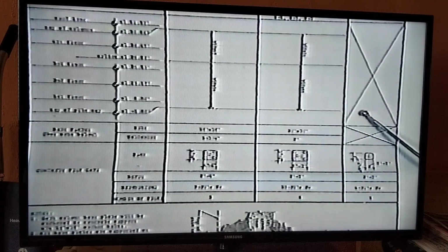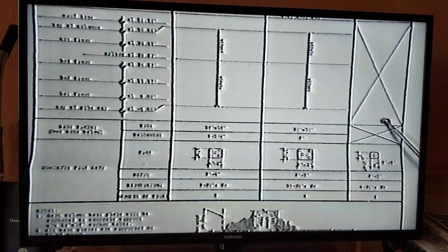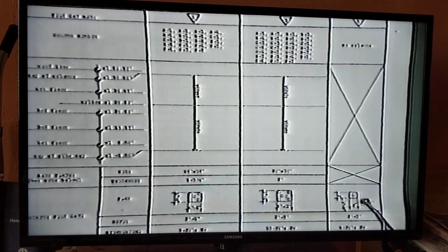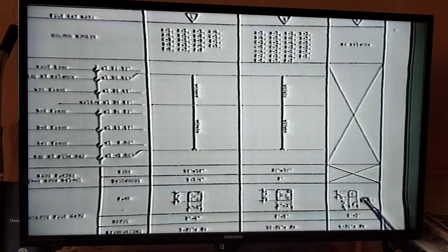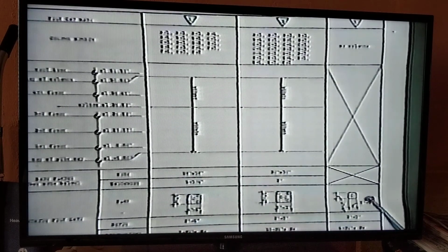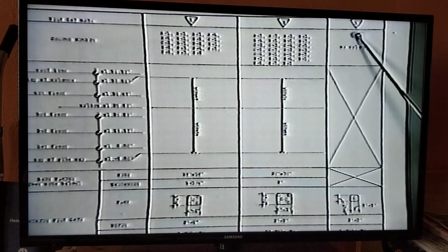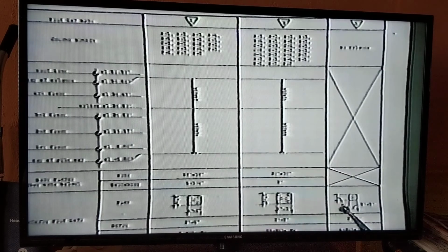However, if we look over at column number 3, we will note that while there are no columns, there nevertheless are piles. Now, this kind of thing can be confusing because they can ask us a question about all the piles in the building. And if we take it as read that there are no piles where there are no columns, we will get it wrong. So we have to keep heads up on that.